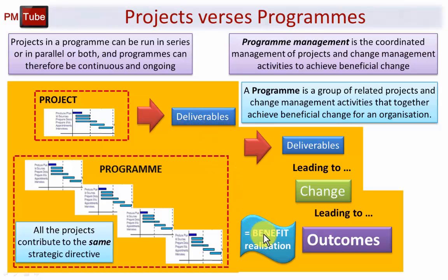Whereas with a program, because you have several different projects, many of these projects would quite naturally finish during the time frame of the program, and therefore the deliverables, or end products if you will, be handed over to the operational area, and therefore it's highly likely, in fact quite normal, that some benefits will be realized during the life of the program. However, just like projects, once the entire program is complete, benefits will continue to come on stream and be realized.